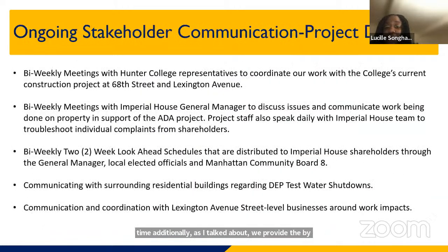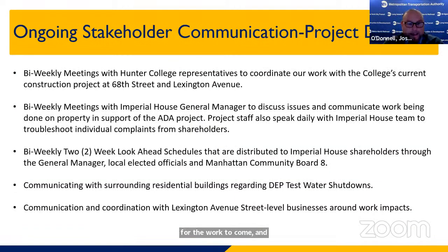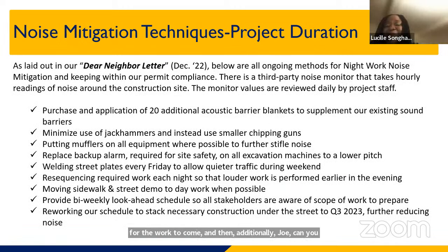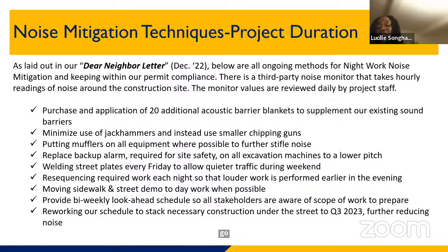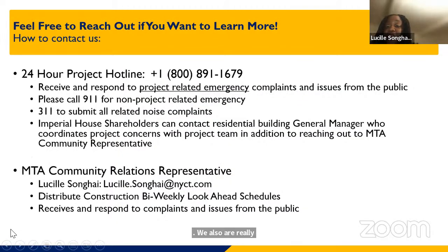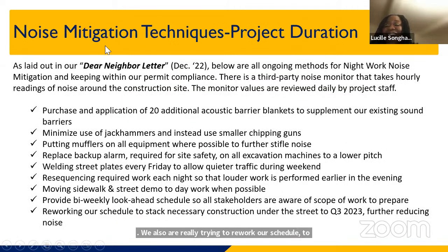And then additionally, Joe, can you go forward? Thanks. We also are really trying to rework our schedule to stack any necessary construction under the street. Can you go back, Joe? Thank you. Under the street to Q3 of 2023, further reducing the work. So that was one of the things that Joe talked about.